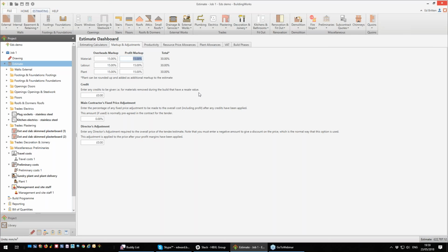So when you're doing your estimate, you put everything in the estimate. You don't omit travel costs, it's a real cost. You don't omit insurance costs, it's a real cost. You build all those in. The way you then control your sales price is by making this higher or lower.